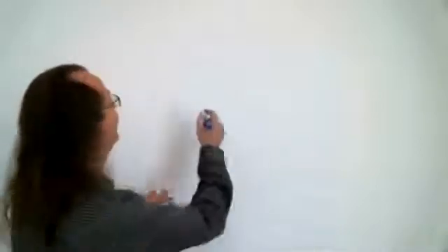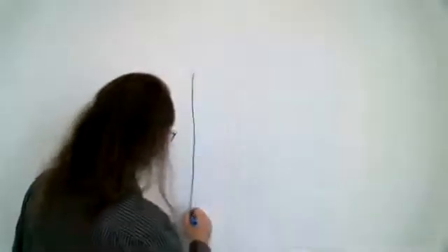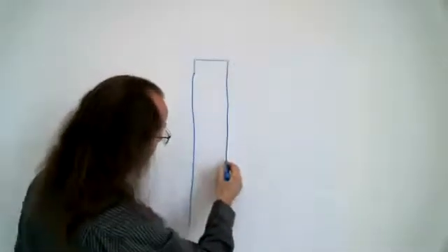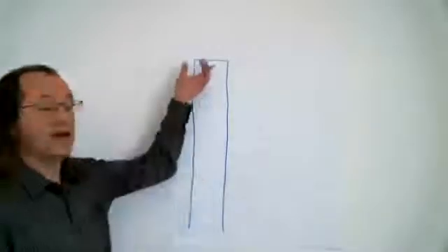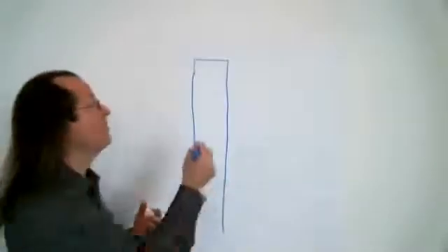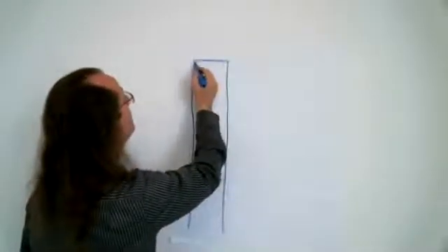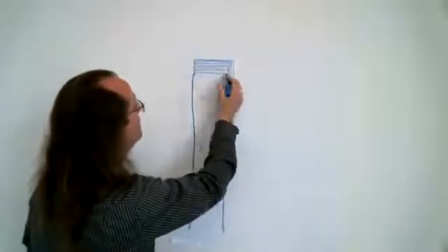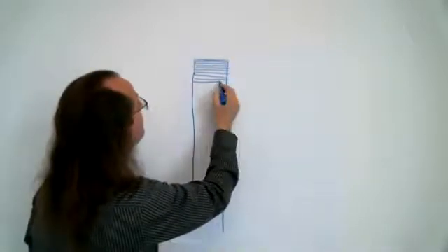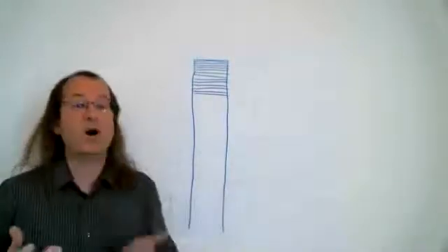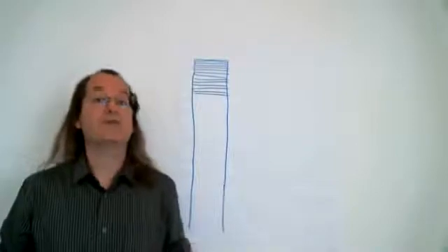So, let's assume we have a product backlog. And I tend to draw product backlogs as stacks. Imagine it as being like a stack of dishes or something like that at a restaurant. And up here at the top of the stack, these are the things we're going to be pulling off first. And so these have to be really small, really well-refined product backlog items. And these are ones that the development team has identified as being sprint ready. And sprint ready means that these items are small enough to fit in a single sprint comfortably.